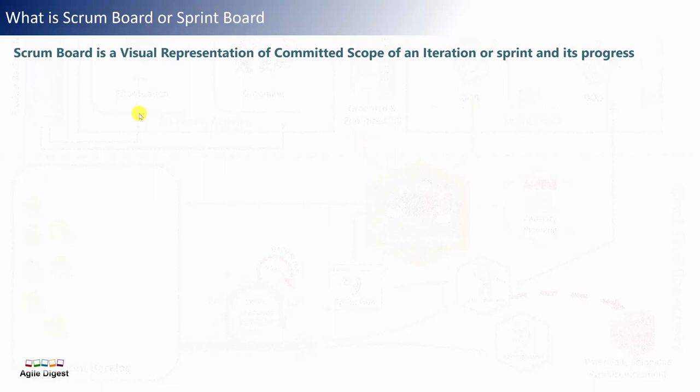The Scrum Board is a visual representation of the committed scope of an iteration or sprint and its progress. When you do sprint planning, you commit a number of stories for one iteration — a particular time box — and you track how you are progressing within that sprint. To give a visual representation of your progress, you need a board where you have all the stories and tasks moving from one state to another. The scope of your commitment is for the time box, while the structure of the Scrum Board remains for the project.